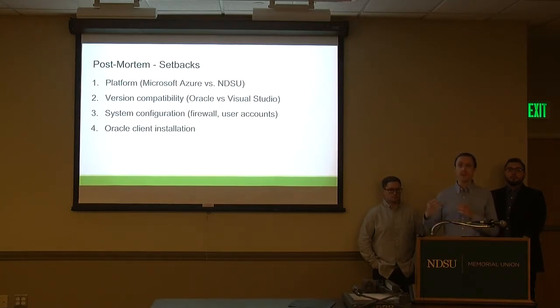Another setback was dealing with version compatibility of software. When we set up the system at NDSU, we originally used Visual Studio 2017, but it actually turns out that the particular version of the Oracle software we needed to use wasn't compatible with the version that we were using for Visual Studio, so we had to go back and rebuild the system again.